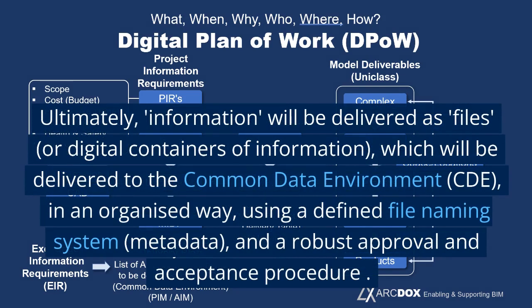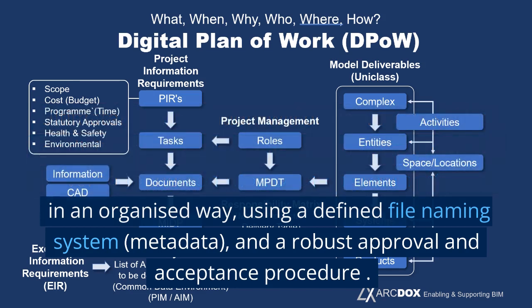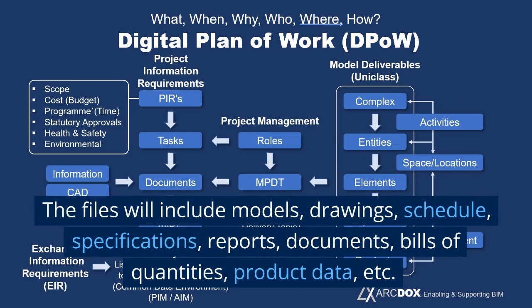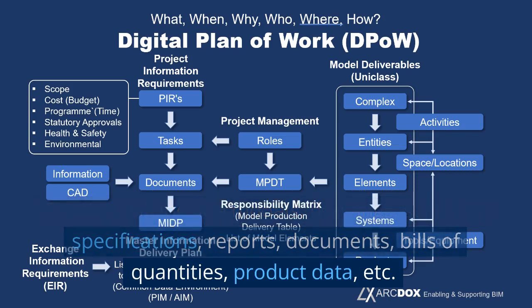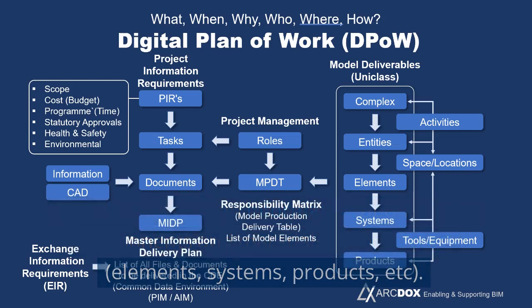Ultimately, information will be delivered as files or digital containers of information, which will be delivered to the Common Data Environment, CDE, in an organized way, using a defined file naming system, metadata, and a robust approval and acceptance procedure. The files will include models, drawings, schedule, specifications, reports, documents, bills of quantities, product data, etc. The files will contain information about all the components and materials of the project, elements, systems, products, etc.